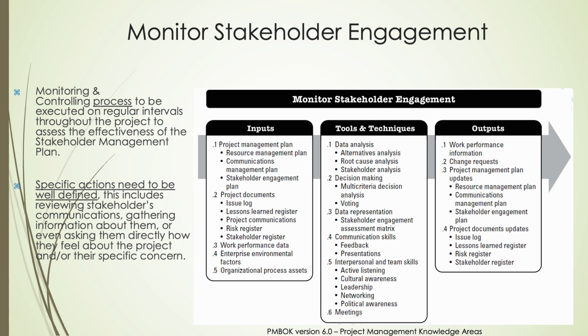Effective stakeholder management is fundamental to project success, particularly when corporate social responsibility goals are in scope. Using a power interest grid, stakeholders are categorized and engaged accordingly. Influential but less interested groups like executives are kept satisfied, highly interested and powerful groups such as customers are actively managed, while operational teams are kept informed and developers are monitored with minimal effort.